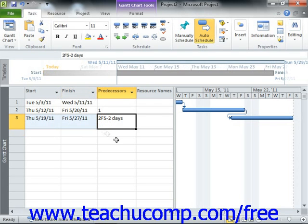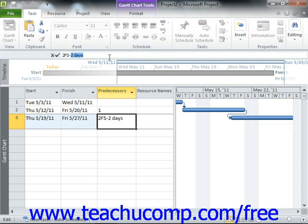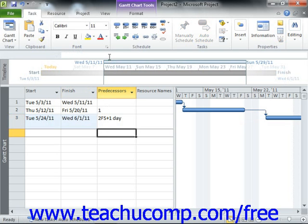Now if you wish to enter a lag time, then enter the precedent task reference, followed by the abbreviation for the type of link that they share, and then enter that value as a positive value. For example, assuming that you have linked tasks 2 and 3 in your project file with a finish-to-start task relationship, if you enter a value of 2FS+1D into the predecessors column for task 3, you would add one day of lag time to the completion of task 2 prior to starting task 3.